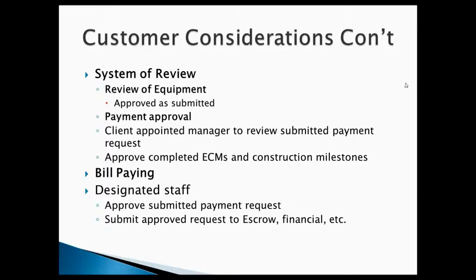You have to have someone who is going to approve that submitted payment request, and then in turn submit the approved request to the escrow or financial institution, the institution that is going to pay the escrow.